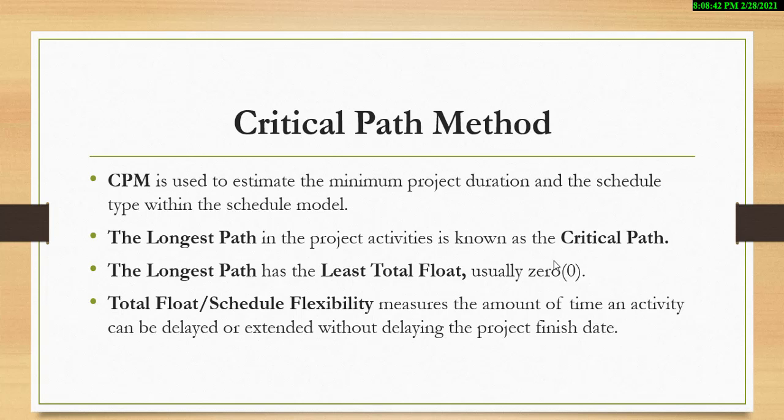Again, when you talk of total float or schedule flexibility, the total float measures the amount of time, take note of this word, the amount of time an activity can be delayed or extended without delaying the project finish date.